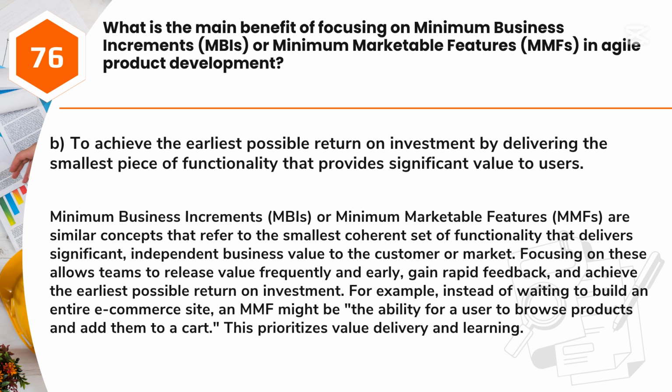Focusing on these allows teams to release value frequently and early, gain rapid feedback, and achieve the earliest possible return on investment. For example, instead of waiting to build an entire e-commerce site, an MMF might be the ability for a user to browse products and add them to a cart. This prioritizes value delivery and learning.